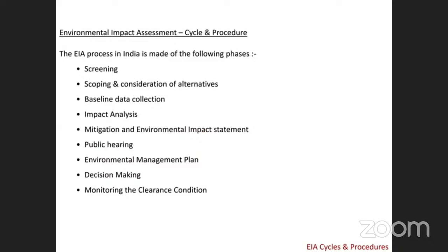EIA involves different steps. The interaction between the various steps: screening, scoping, baseline data, impact analysis, mitigation, public hearing. The first one is the screening.